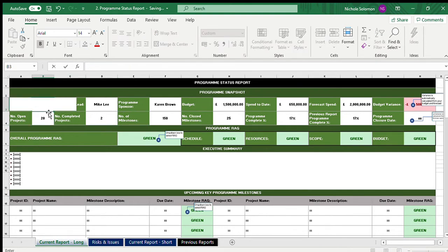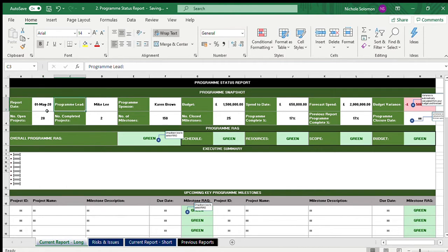What you can do here is put that 17% there, and then when you submit your next report, you change the date. You know that your last report said 17%, and this time round you're actually closing 40. So you can see progress against the previous report cycle, which is 17%. Then you go into your closure date, which is the 30th of the 12th, 21 of the entire program.